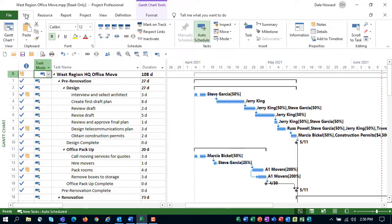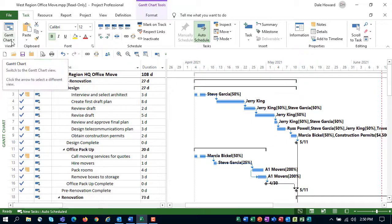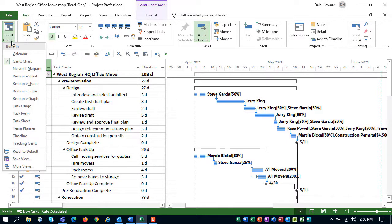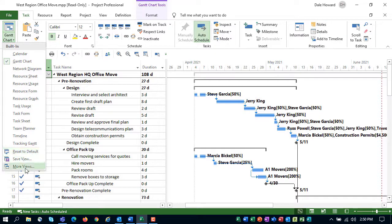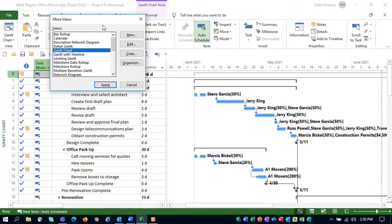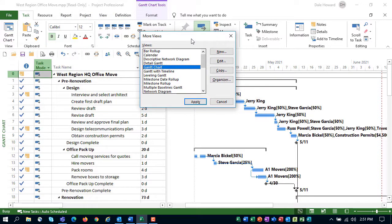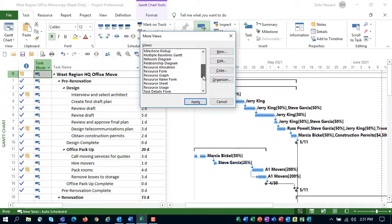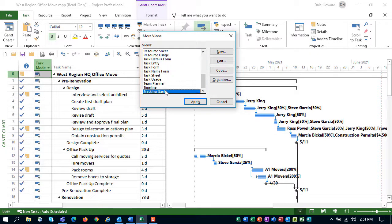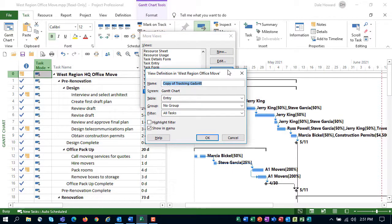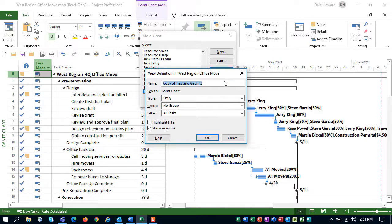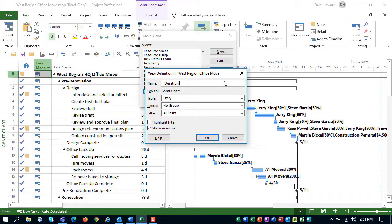Click the Task tab to display the task ribbon. Then click the Gantt chart Pick List button and select More Views. In the More Views dialog, click the Tracking Gantt view to select it and copy it. What this is doing is copying the Tracking Gantt screen on the right side of our custom view. Now, in this new custom view, we need to give it a name, so we're going to call this Underscore Duration Variance. That's its purpose.